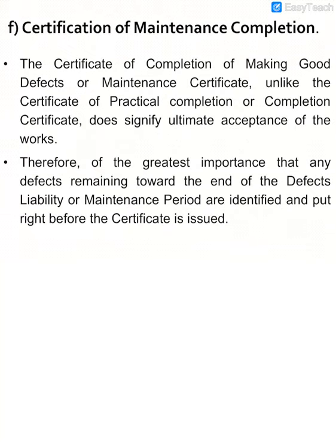Okay, next is the certificate of maintenance completion. The certificate of completion of making good defects, or maintenance completion, unlike the certificate of practical completion, does signify ultimate acceptance of the work.